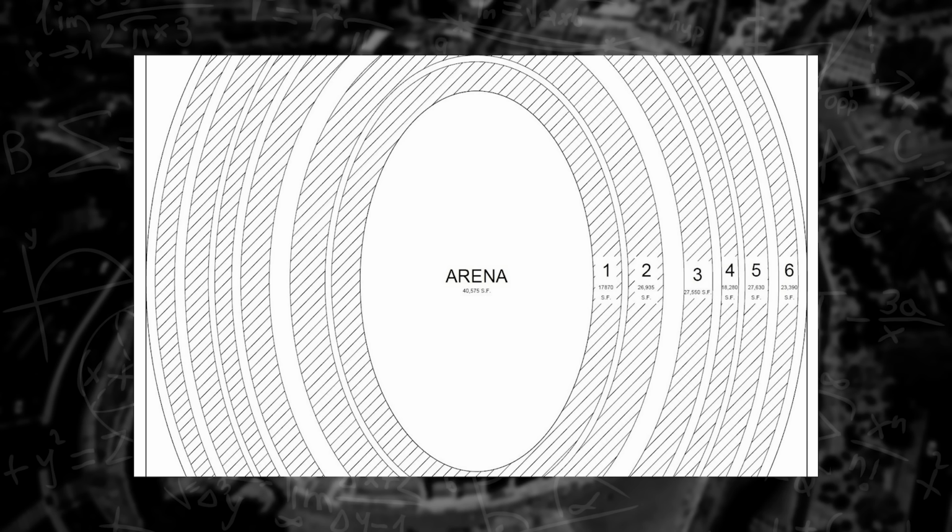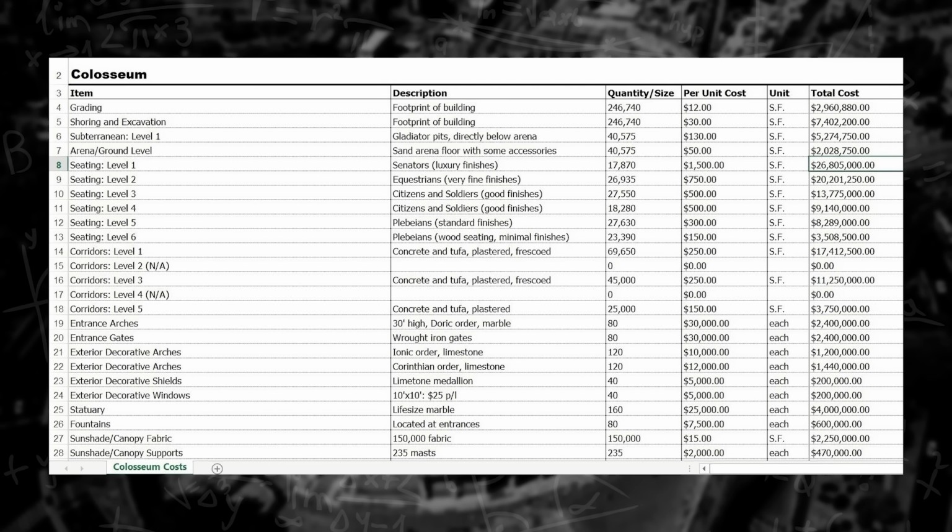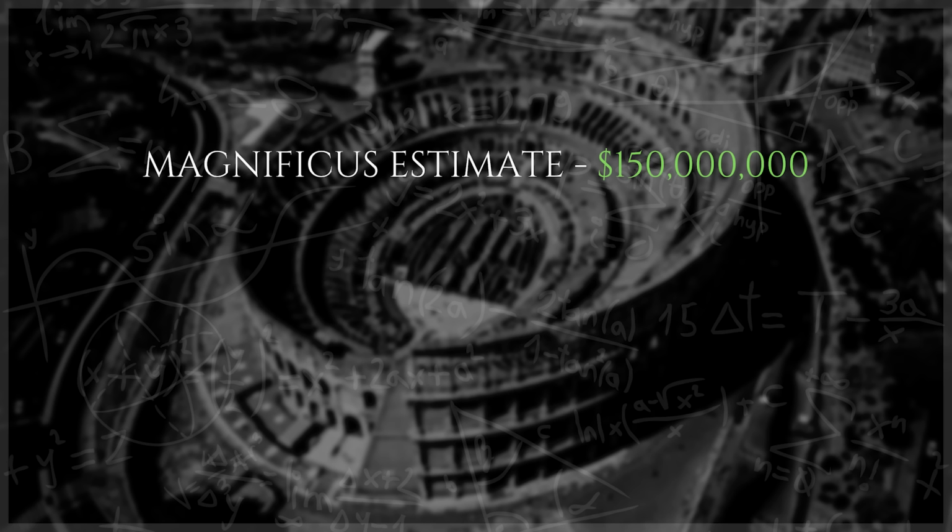The first of the 3 detailed estimates I received was submitted by a subscriber with the username Magnificus, an architectural project manager. With the use of computer-aided design and estimating software, he proceeded level by level, expensing by material and finishes. Thus, he assessed the cost of the senatorial podium, with its lavish use of marble, at nearly $27 million, but assigned the uppermost tier of seating, with its wooden benches, a cost of only $3.5 million. He believed that the 160 marble statues perched in the upper arcades could be made for a cool $4 million with CNC stone carving machines. The entire Colosseum, he estimated, could be replicated for as little as $150 million.